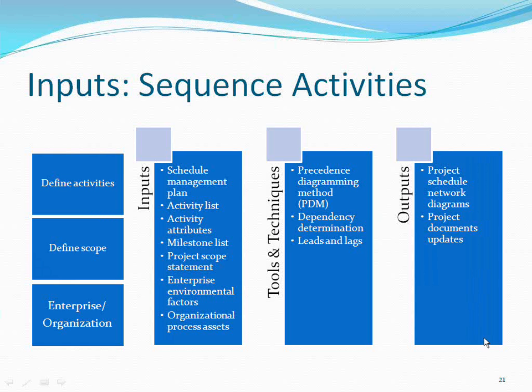As I told you, mandatory dependencies are sometimes legal, contractual, or inherent in the nature of the work. These are called mandatory dependencies. As I told you, foundation and superstructure. If you want to raise the superstructure, it's mandatory that you have to finish the foundation. There is some dependency on that. Okay, that is mandatory. Discretion: if you want to wait for that activity to be finished, you wait, or else not. It's left to your discretion.